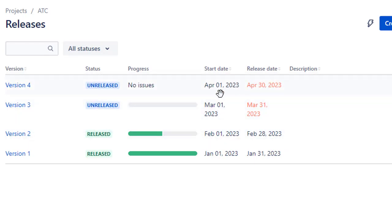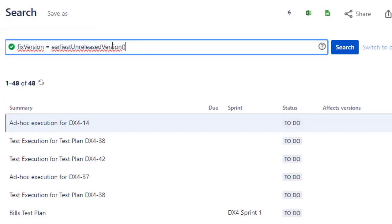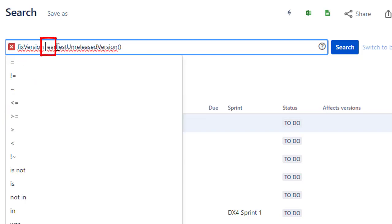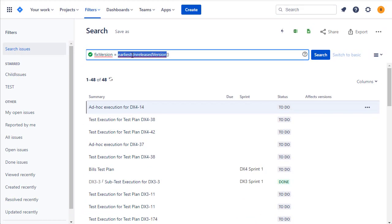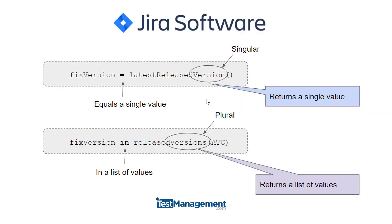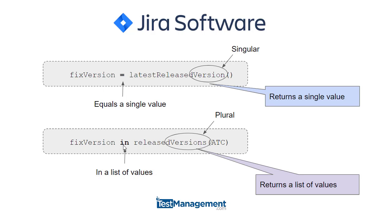Something worth noting is the difference between equals and the IN statement. Which one you use is determined by what these functions return. latestReleasedVersion is singular — it returns one version, so we use equals. releasedVersions is plural — it returns a list, so we use the IN clause instead.